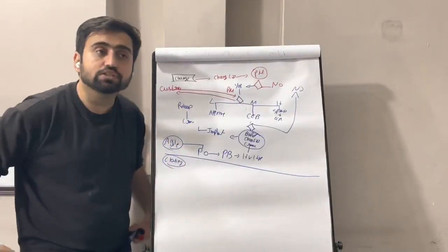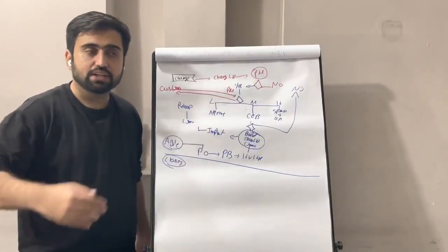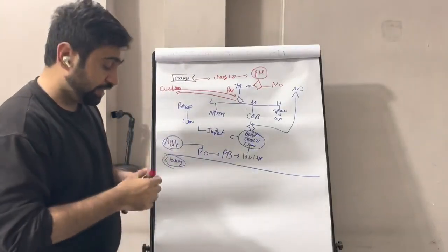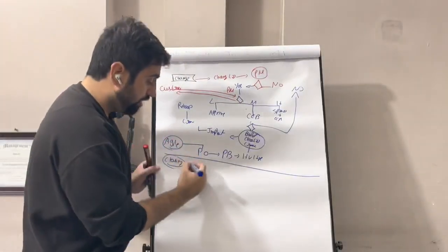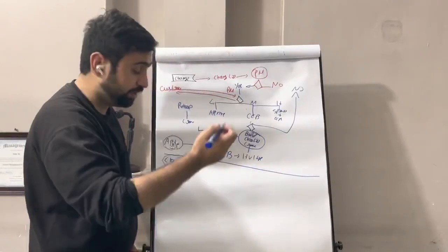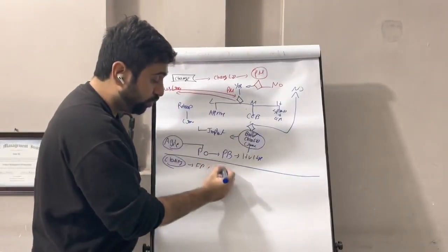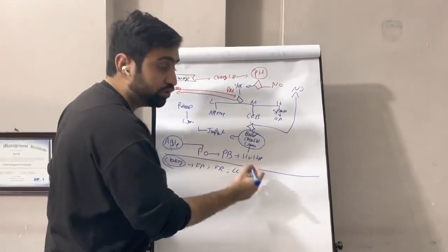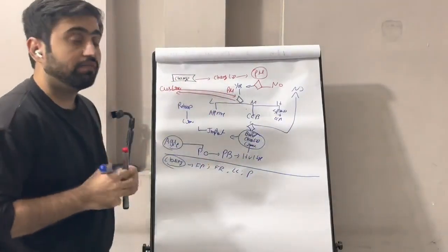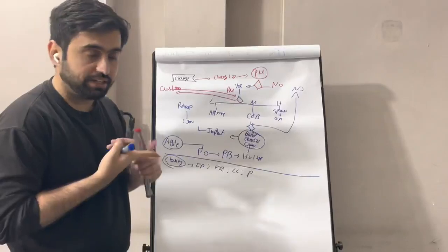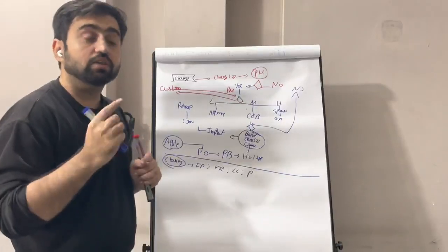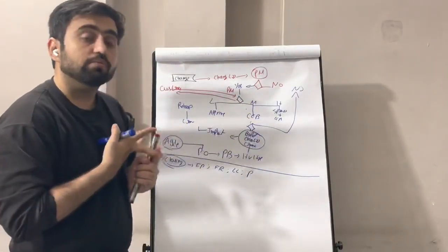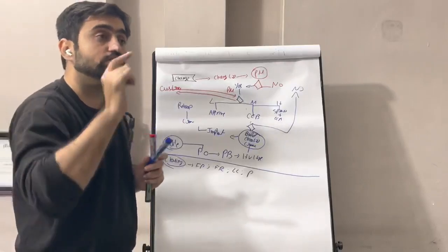So we are in the closing, the procurements are there, everything is there. The accepted deliverables get converted into the final product that is being shifted to the people. We start writing the final report. We start writing the lesson learned register. We start writing the project update documents. Once all the lesson learned registers are written, they are updated. It goes to the lesson learned repository. Project documents are updated. It goes to the archive.